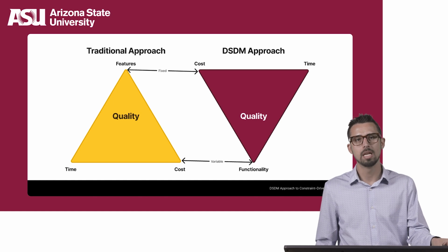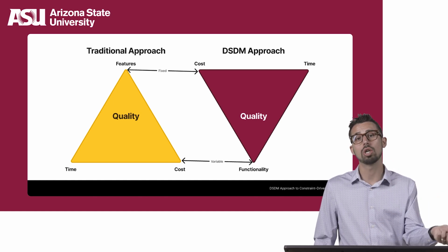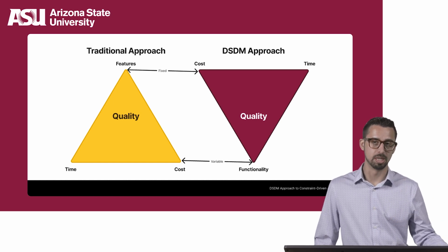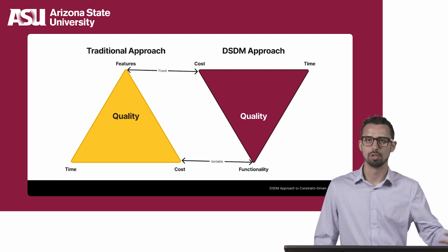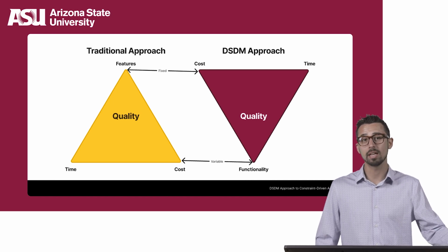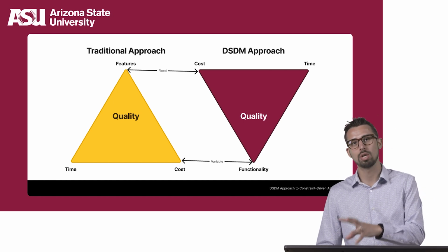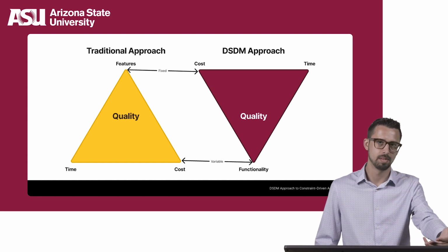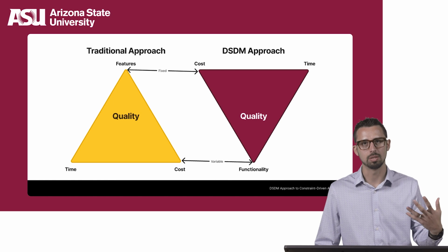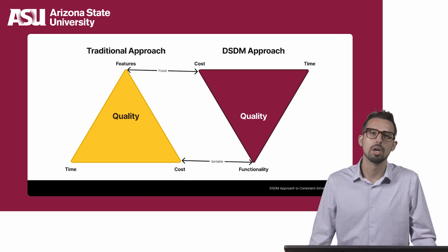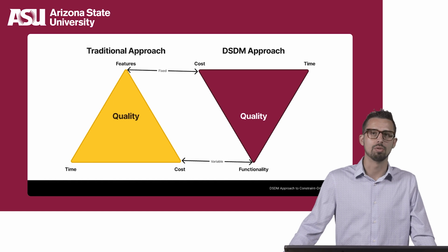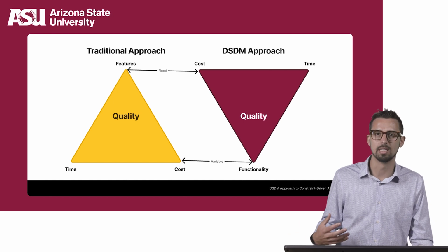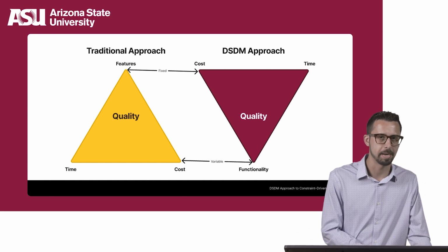With DSDM, that whole process gets turned upside down. And that question then becomes, what are we trying to build, or what functionality are we trying to achieve or implement? Then the team works backwards by solving for those functions without sacrificing quality and flipping the bill at the end. Obviously, this approach has its challenges when it comes to selling the product. So that is where the team's proof of execution comes into play, typically through very similar case studies that the team has completed successfully in the past.